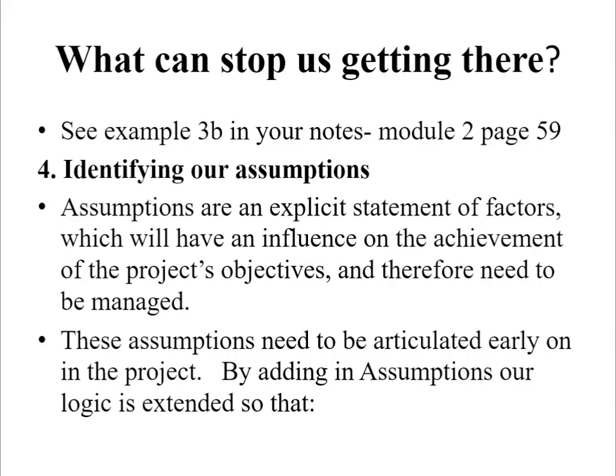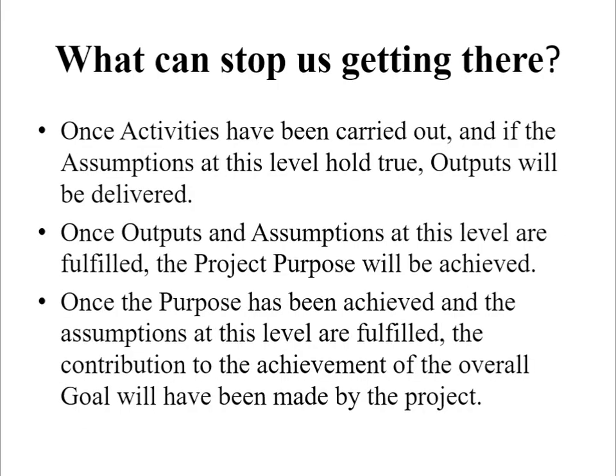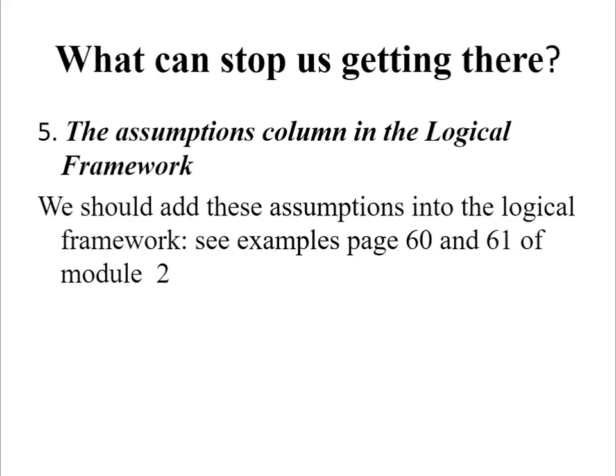By adding in assumptions, our logic is extended so that once activities have been carried out and if the assumptions at this level hold true, outputs will be delivered. Once outputs and assumptions at this level are fulfilled, the project purpose will be achieved. And once the purpose has been achieved and the assumptions at this level are fulfilled, the contribution to the achievement of the overall goal will have been made by the project. Once the assumptions have been identified, they should be added into the logical framework. See examples on pages 60 and 61 of Module 2 for further clarification.